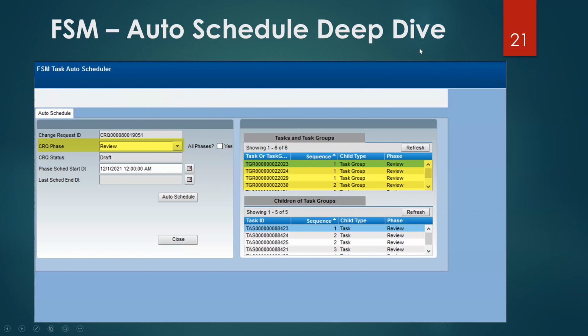Okay. So how are you handling weekends and stuff like that? Are you using business hours or? Thank you for asking that question. That was a piece I meant to talk about, and I'll probably talk about it a little later in here. But when I go through it, I actually use business time to calculate everything out. What I ended up doing when you're calling business time, you have to identify the time segment that you care about, that you want to use in it.